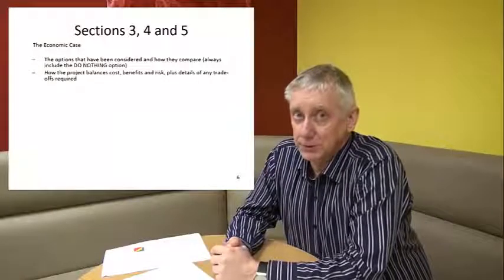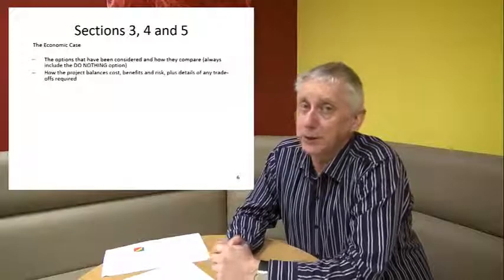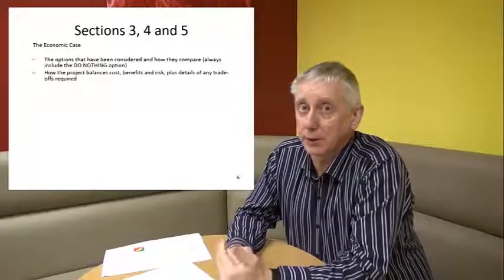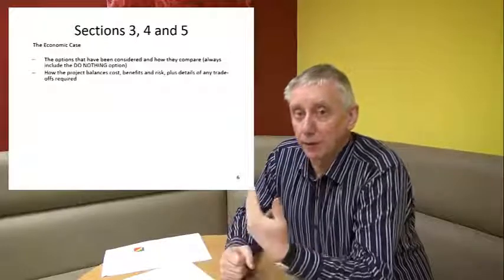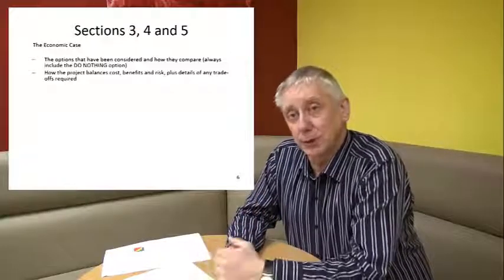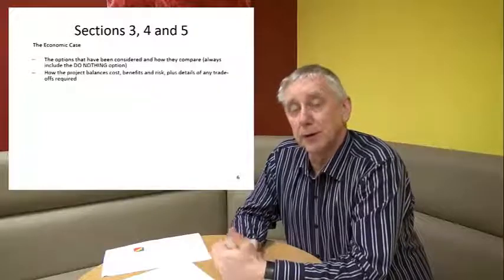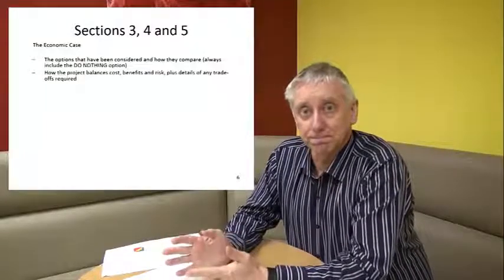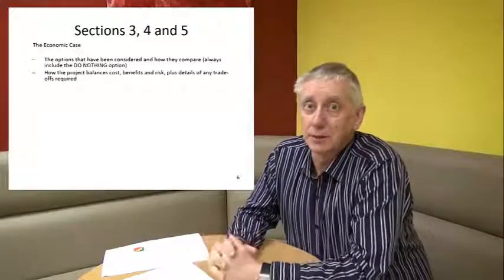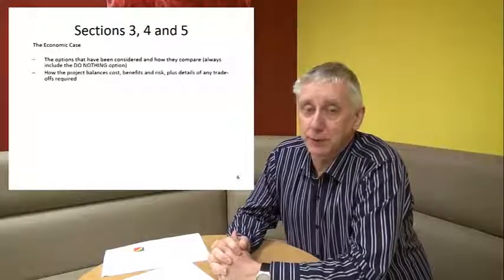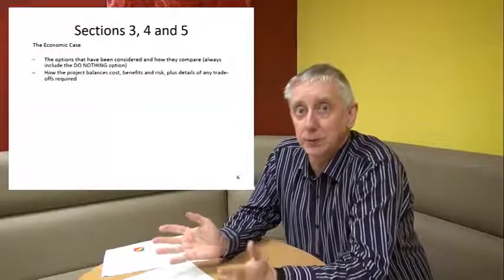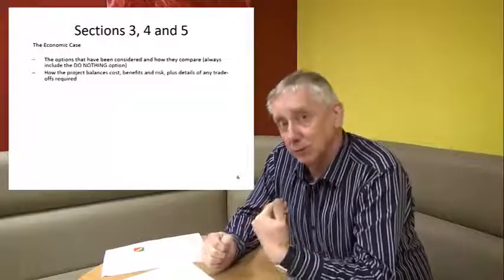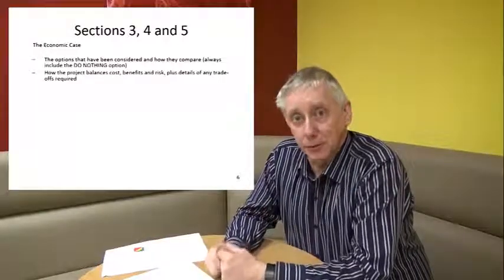I've seen business cases fail not because the ideas that they put forward were not brilliant. The numbers stacked up, but what they failed to do was to articulate the damage that would be done if nothing were done. And because of that, the decision-making body simply turned around and said, you've not made the case for change. Your ideas are good, but why should we be changing anything at all? So you must always include the do nothing option.